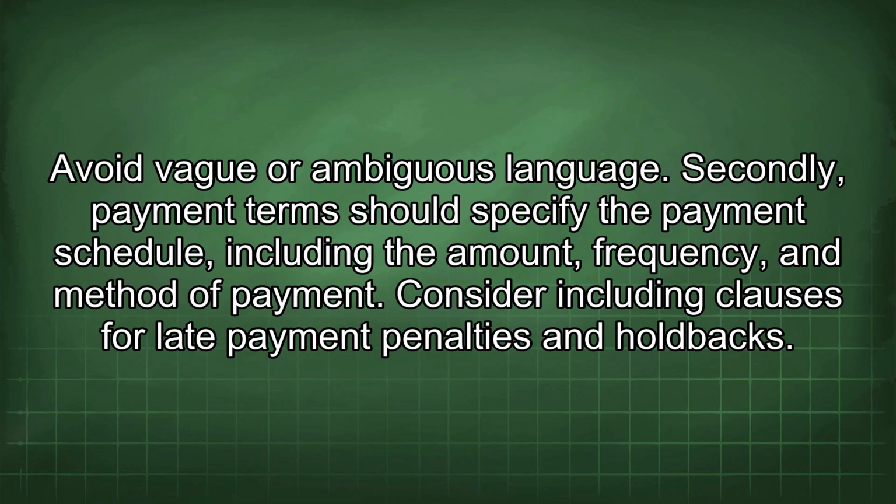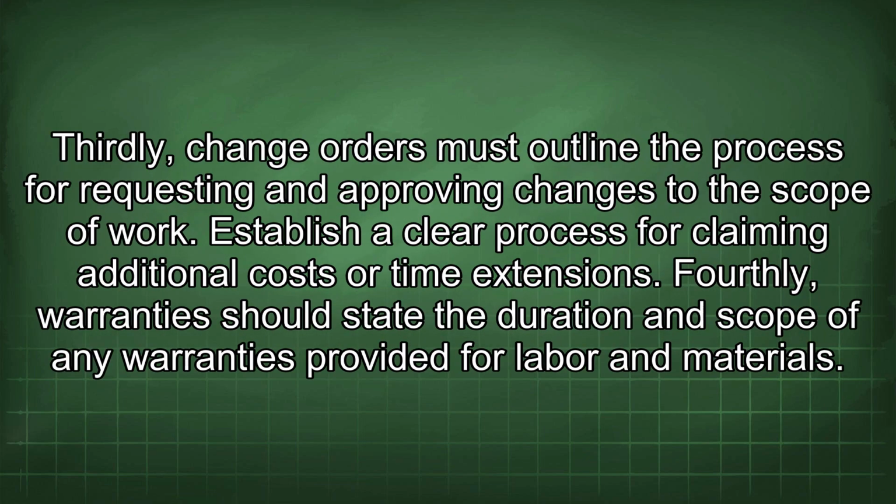Secondly, payment terms should specify the payment schedule, including the amount, frequency, and method of payment. Consider including clauses for late payment, penalties, and holdbacks. Thirdly, change orders must outline the process for requesting and approving changes to the scope of work. Establish a clear process for claiming additional costs or time extensions.